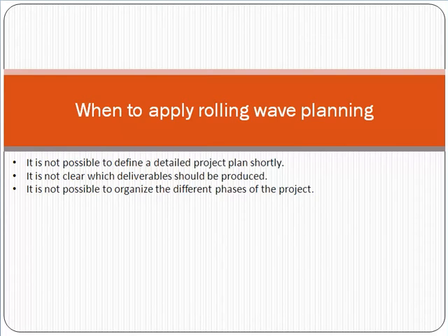You know that detail level planning can't be done in only 2 days, so what you will do is the detailed planning for the current stage. For example, you have to start from the planning stage, so you do the detailed planning for the planning phase, and for the rest of the phases like development, testing, and production deployment, you do rough estimations. Just take it as an example of rolling wave planning.